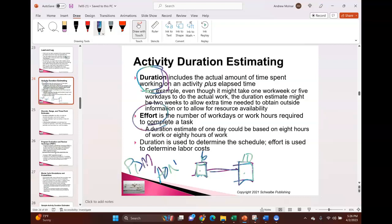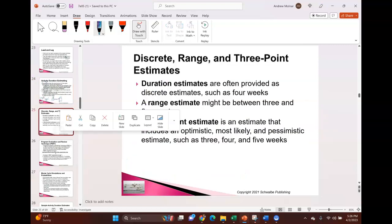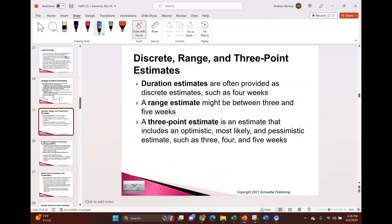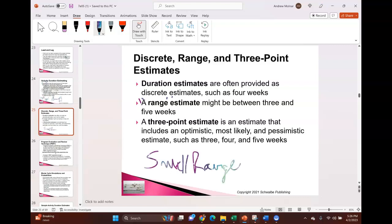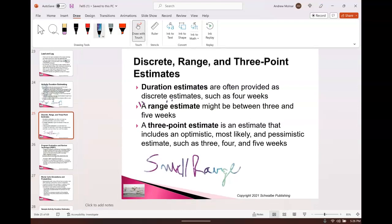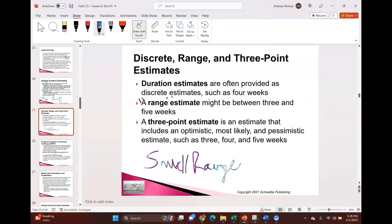An activity takes effort, typically measured in work days or work hours, as long as the measure is consistent. Duration estimates are often provided as discrete estimates such as four weeks, or as a range. A small range is considered the best estimate. A large range — say two to eight weeks — increases risk significantly. But a narrow range like seven to eight weeks is very useful because it helps the schedule stay on task. You won't see a range on any test, but it's a good concept to be aware of.